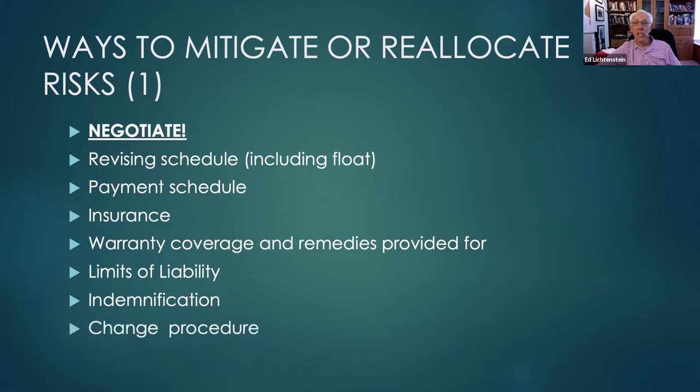All right. The change procedure. What constitutes a change? What defines a change? How's it going to be priced? How's it going to be included in the schedule? All of them are ways to mitigate or reallocate risk. How soon a change has to be identified. How soon it has to be processed. When you have to start work on a change. All of these are ways to mitigate or reallocate risks.